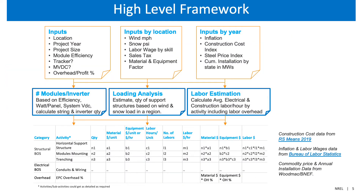This is our high-level framework for our system cost modeling. Basically, in order to calculate all the key cost components we need to list out all the major steps involved in a PV installation project, like the ones highlighted with blue-colored borders here. We also need to figure out different inputs required and then set up the calculation depending on our benchmarking needs.